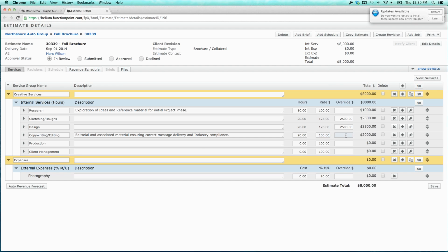Don't adjust the rates, adjust the override. If I think it's going to take 20 hours and our standard rate is $100, well, that's the value, $2,000. If I need to come down by $1,000, override this to $1,000. Don't go changing rates. Don't go to the admin section and change things there. Don't change the rates here. Don't add staff with lower rates. Just put in an override in order to get to that dollar value.